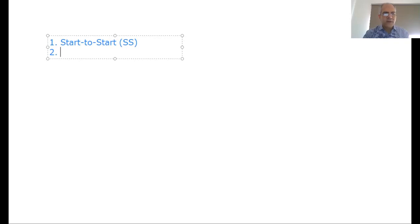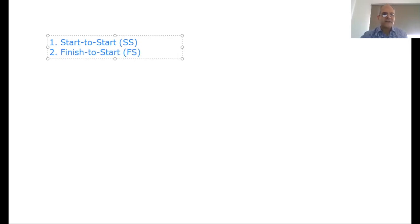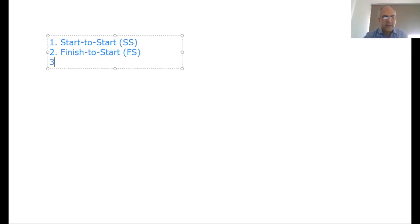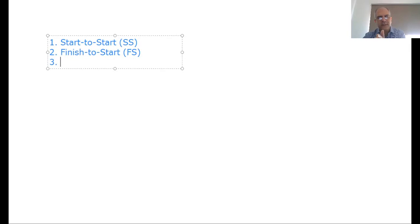The second type of dependency is called Finish-to-Start, written as FS. This means activity A must finish in order for B to start. One activity runs its full duration, and then the output of the first activity becomes the input for the second. The second activity cannot begin until the first has come to a conclusion.